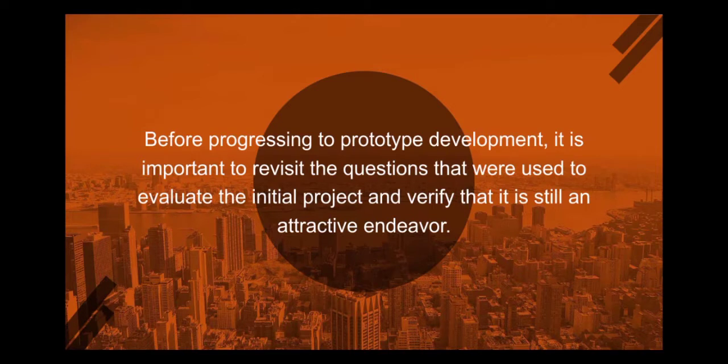Before progressing to prototype development, it is important to revisit the questions that were used to evaluate the initial project and verify that it is still an attractive endeavor. If the new information gathered results in the project no longer passing the initial screening questions, the new product may need to be modified or cancelled. This can be a critical milestone when another go or no-go decision must be made.